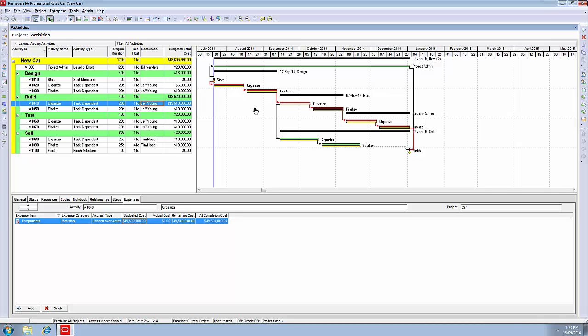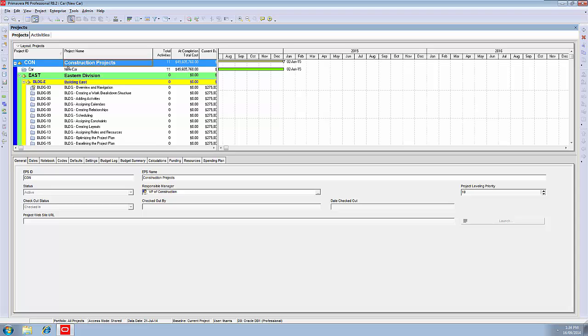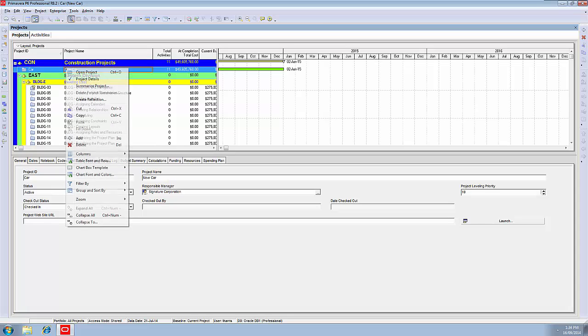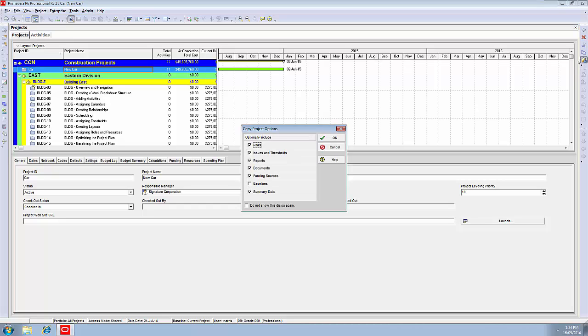The first thing we have to do is think about safety, and we should be making a backup of our project because this is a time when things could go wrong dramatically. We need to make sure we've got a copy of our project available. We go back to the projects window, highlight the new car project, right-click on it, and say that we want to make a copy. Then come over to the right, find the paste button, hit paste.